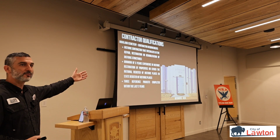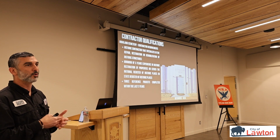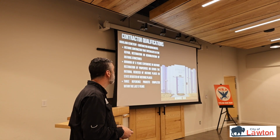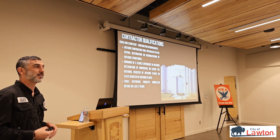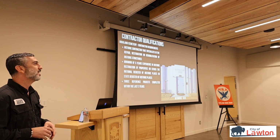If you're building new developments and trying this and trying that and all of these other things, we haven't specialized and know the ins and outs of these historic structures. They also called for a minimum of 5 years experience in historic restoration on properties, either through National Register or State Register. And again, I've talked about all the lessons we've learned, all the warranty work that we have done,